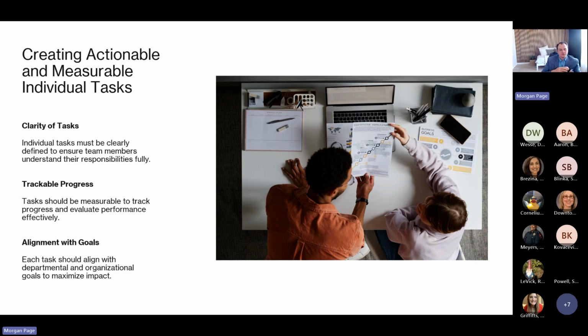It also helps prevent a common problem in the process. When someone gets assigned a task, oftentimes it'll be gain an understanding. And what will happen is Jim Bob will talk to Sally Sue, and then come back and say the task is done. And then that gets reported as a task complete. And then after that task is complete, inevitably a document gets reviewed or it gets surfaced up and someone goes, well, this isn't right.